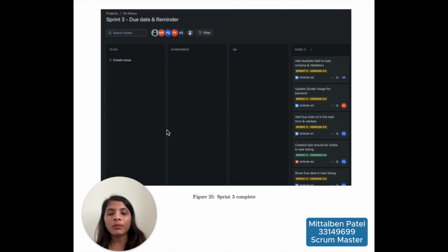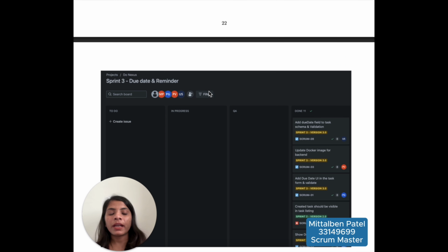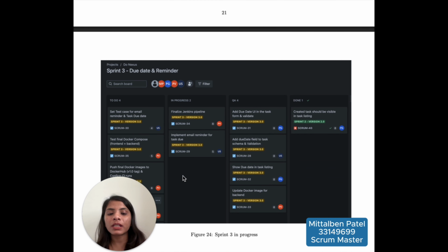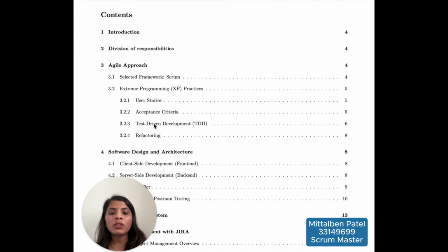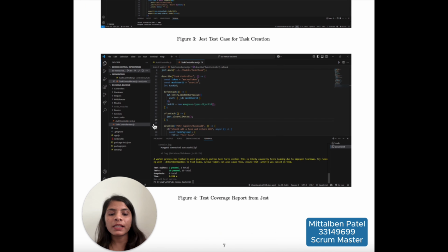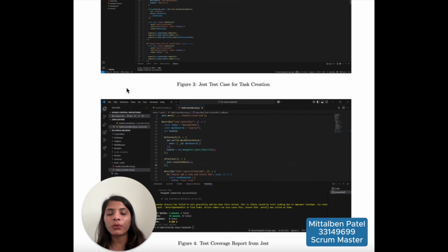To support team communication, I hosted daily stand-up meetings on Zoom where everyone shared their progress, plans, and any blockers. These short meetings helped the team stay connected and solve issues quickly. I also ensured that we followed test-driven development and extreme programming practices like task estimation, regular refactoring, and code quality checks.